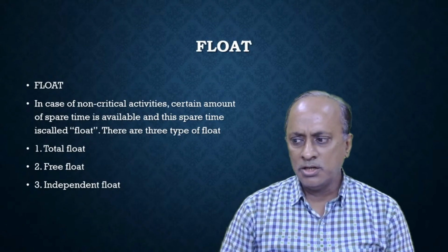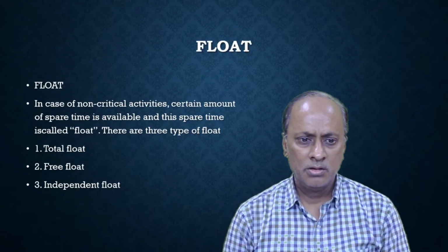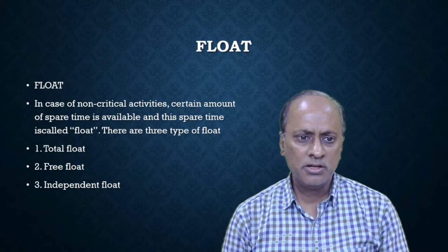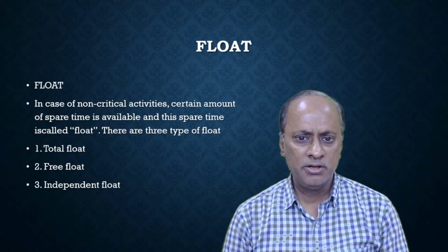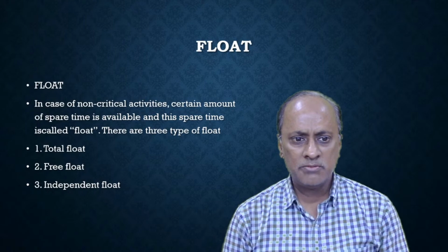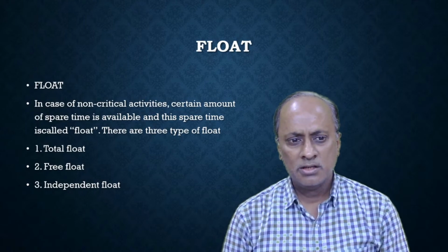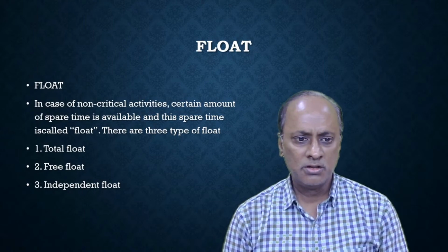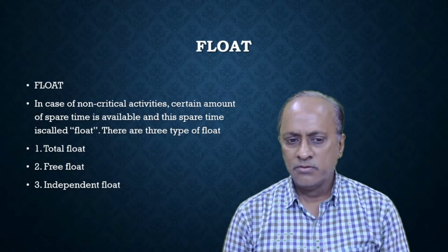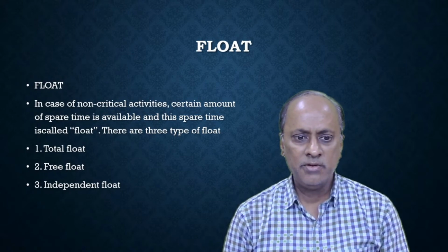So another important concept is float. What is float? Float refers to idleness. In case of non-critical activities, a certain amount of spare time is available, and this spare time is called float. There are three types of float: total float, free float, and independent float.